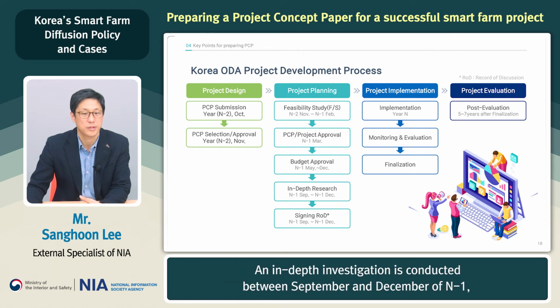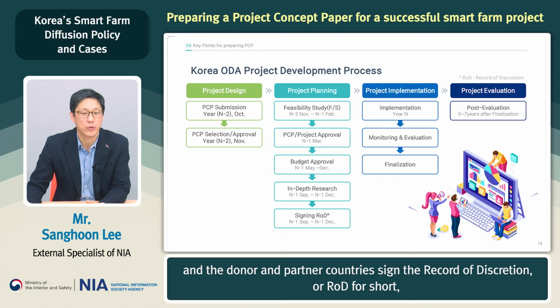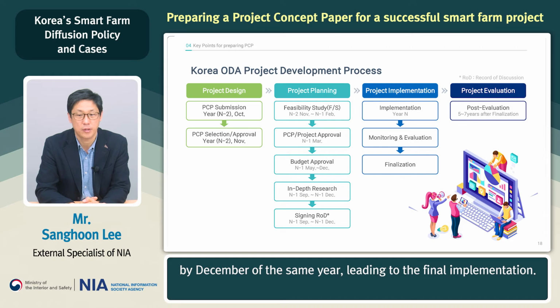An in-depth investigation is conducted between September and December of year N-1. And the donor and partner countries sign the record of discussion, or ROD for short, by December of the same year, leading to the final implementation.